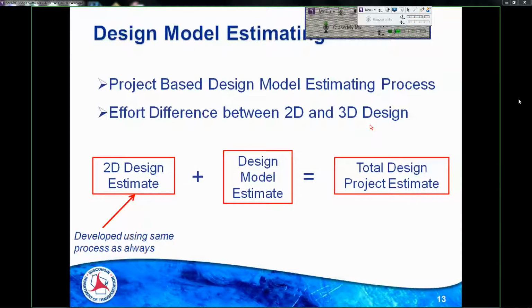Okay? And when we pulled that together, we took a break as a group. And we came back 2 or 3 weeks later and we had a day-long meeting and we shared our individual estimates for those extra work elements as a group. So each task force member in that break period had some homework to estimate each one of those extra work elements. And then we came back together as a group and we presented our estimates to each other around the table, work element by work element. And we talked to each other.